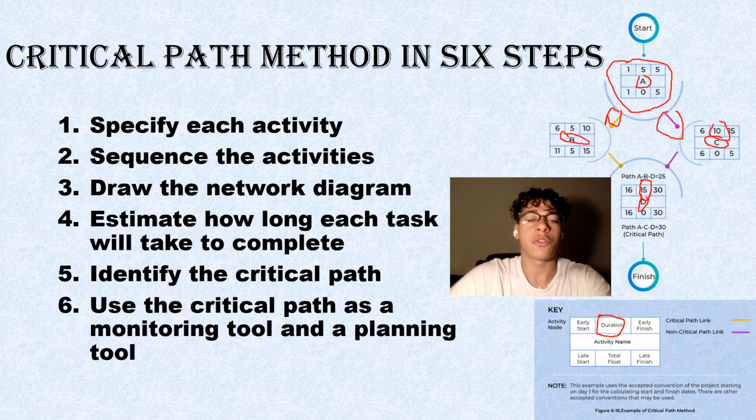You would identify the critical path by sequencing the longest route in this diagram. And it is critical because every task or activity will depend on the other. If you were delayed on one task, the entire project is already delayed, just like in the Gantt chart.